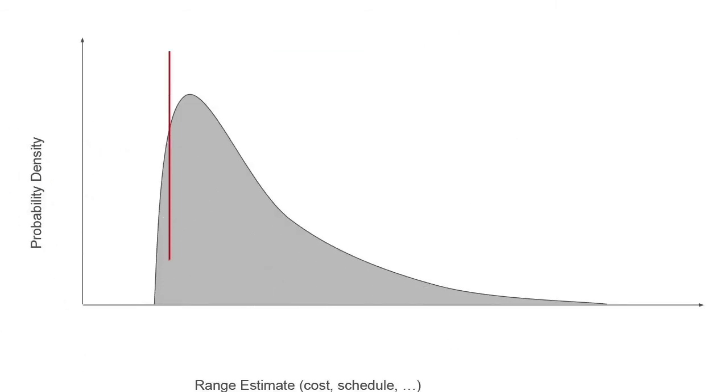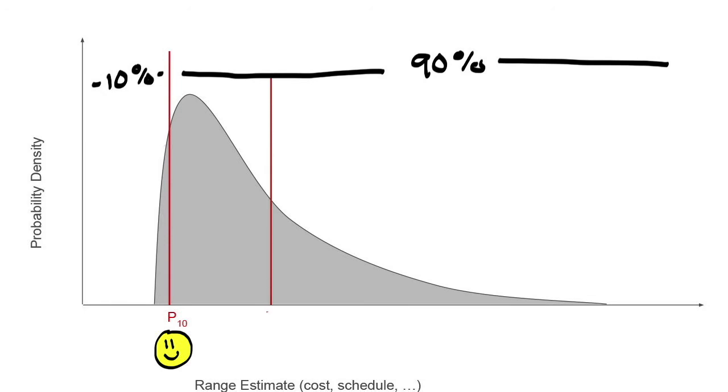The oil and gas industry typically defines the optimistic case as the P10, that is a 10% chance of lower, 90% chance of higher. The median case is the P50, 50% chance of lower, 50% chance of higher.